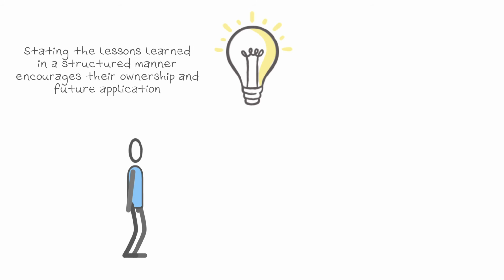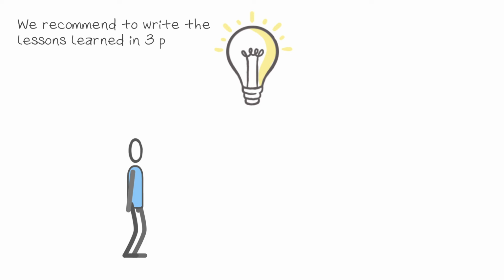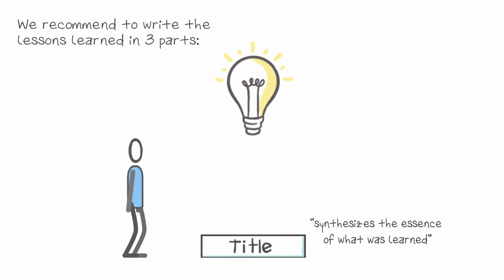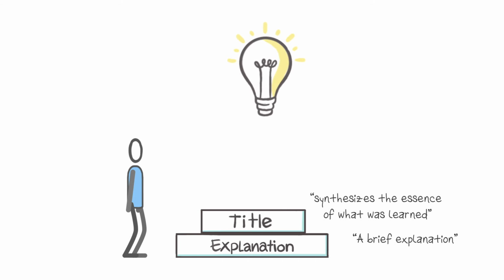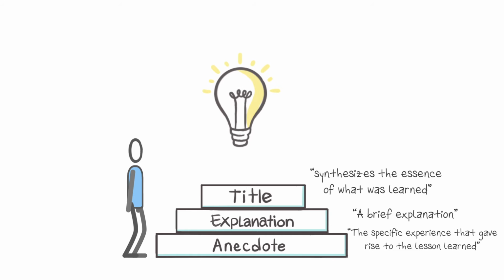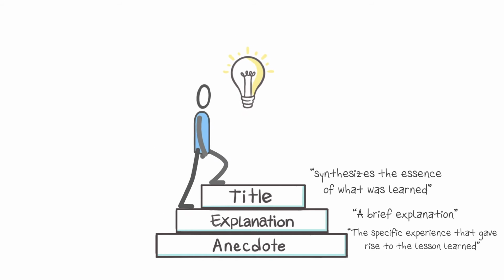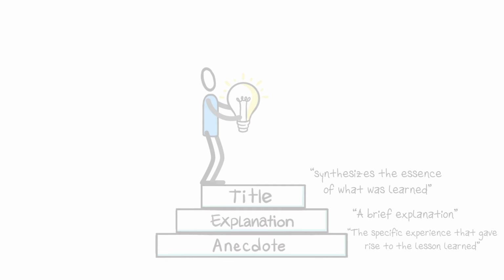With this in mind, we have found it useful to write the lessons learned in paragraphs that have at least 3 parts. A title, which synthesises the essence of what was learnt, a brief explanation of what was learnt, and an anecdote, or the reference to the specific experience that gave rise to the lesson learned. Let's look at an example.